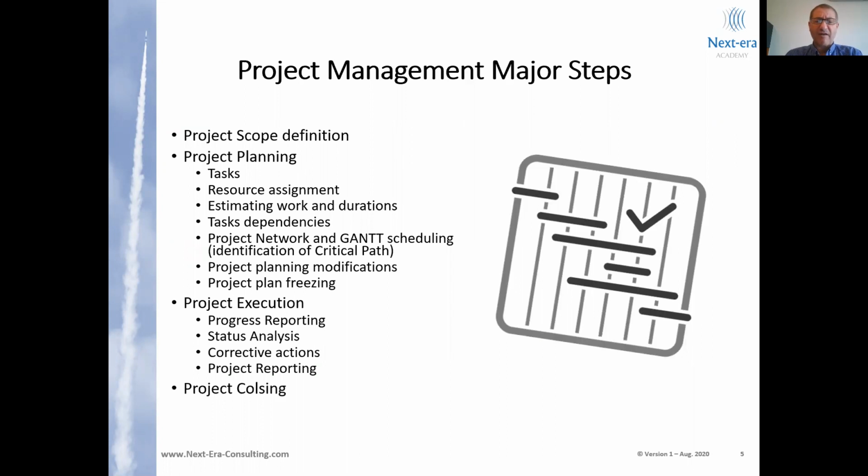Just as a clarity about the project management practice in terms of tasks that are called project management, it starts with the scope definitions, go to a process of project planning, what are the project tasks, who are the resources that will execute it, how much time and effort is required to execute each one of the tasks, understanding the interdependencies of sequence between the tasks, creating a project network to schedule those tasks, converting the schedule into a Gantt chart that shows us the schedule against the timeline,